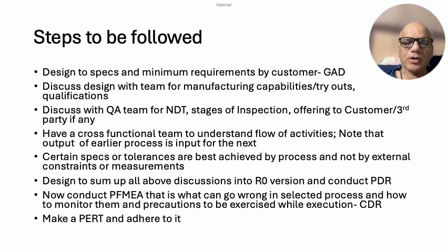But now a cross-functional team, once again all the stakeholders in the execution of this particular project, will sit and do a preliminary design review. So from the general assembly drawing, we have now come up to the preliminary design review. This is a place for process failure mode analysis.